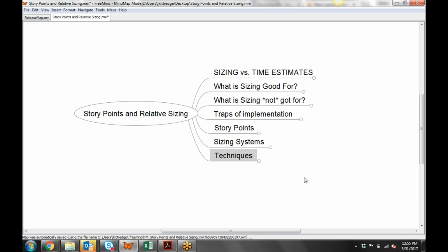In Agile development, we generally have deliverables categorized into two categories: is it a time box deliverable, or is it a feature box deliverable? Those are words I throw around all the time, and I argue with people about them all the time. A time box deliverable says, on this date, we're going to deliver you something. I'm not going to tell you what it is. I think it's going to be this, but it might or might not fit. Based on your priorities and our ROI metrics, we're working on this and this and this, and we're going to get as far down the list as we can, and that's what we're going to deliver because you need to have it on this date. That's one way of delivering.